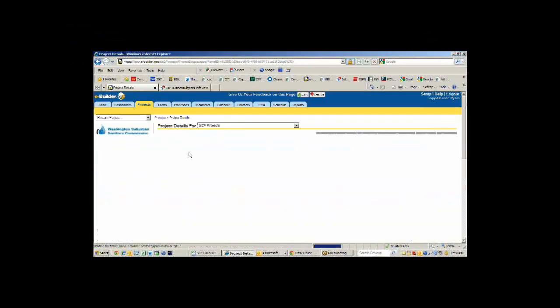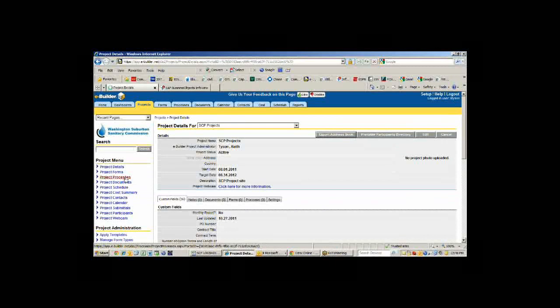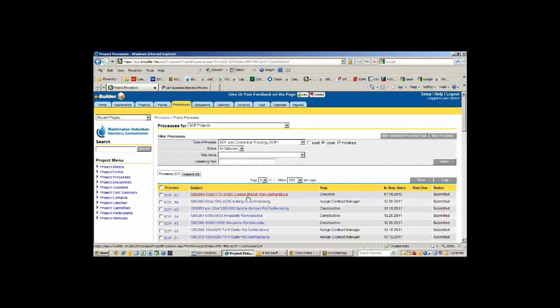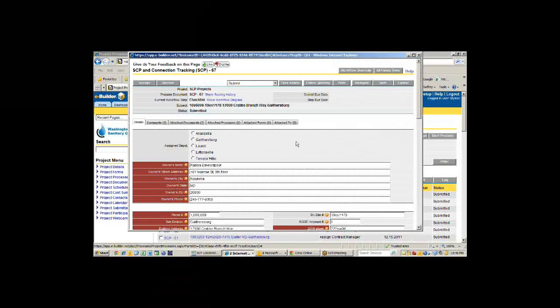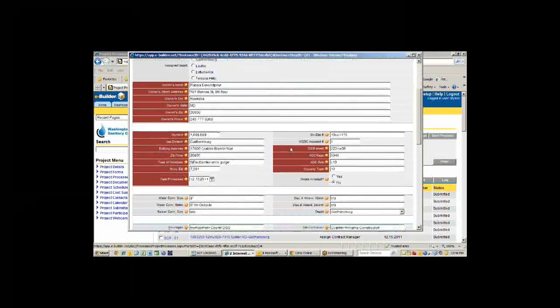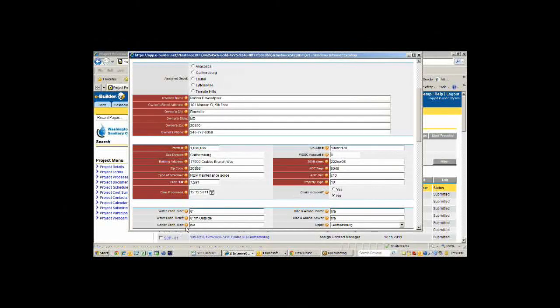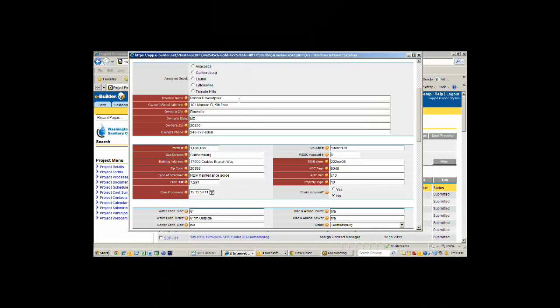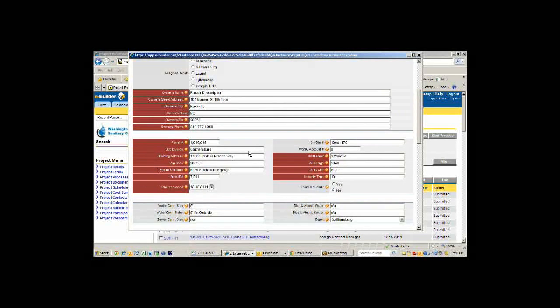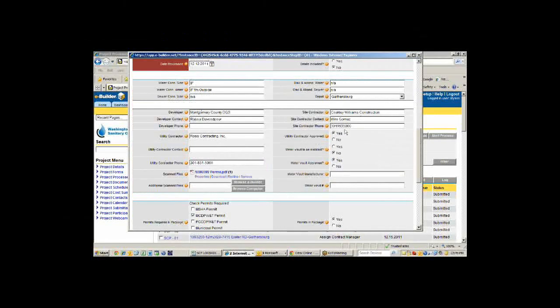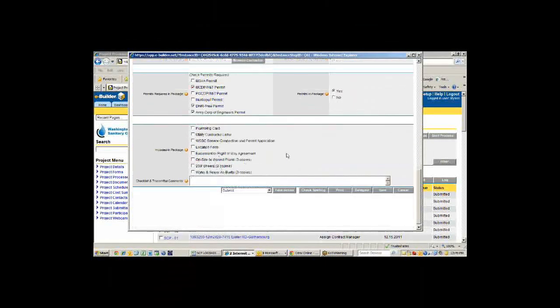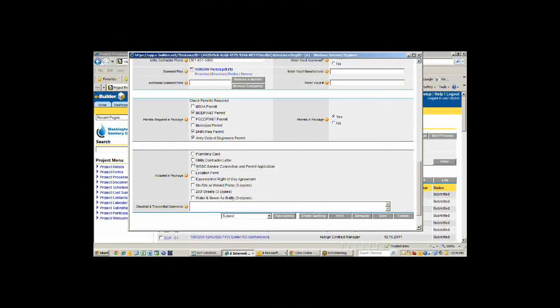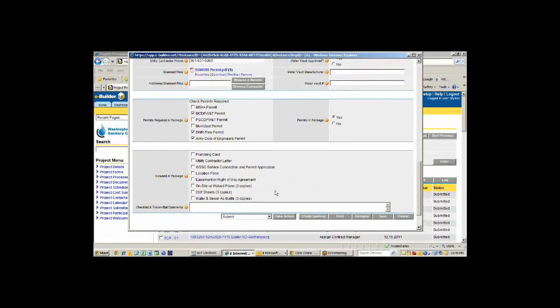If I go back to that project and start one of these processes, or actually I'm going to pick one because I want to show you the flow chart. What we start with is basically this information, from owner's name down to connection size. That's what we start with. That's entered by our engineering assistant when she gets the package from the permits groups. It goes through review. We add all the information about the developer and the contractors and what permits are required. Then once we're ready to send it to construction, we'll add whatever other information we have, like the location form and the 200-foot sheets, that kind of thing.